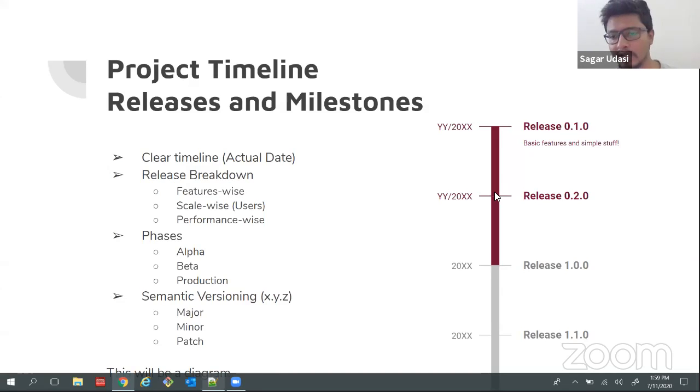So when we do that in a company, when we want to work on some project which we want to develop very rapidly, we usually have daily stand-ups. So we have daily meetings on that project, sometimes even twice a day, where we start with what we are doing today and then what we have completed. So we might have to increase the frequency if we follow that method.